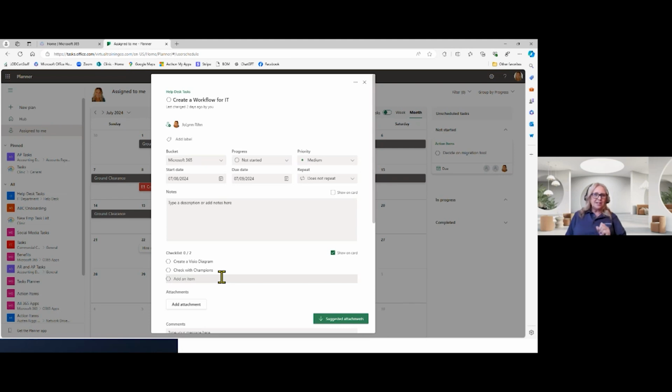So if there are any project managers out there in the session today, I do a lot of project management. I teach project management, the PMP certification courses, but when it comes to managing a project, we always think about the WBS, the work breakdown structure, and we have deliverables. That's what this technically would be, this is going to be our WBS. And then it's broken down into deliverables, work packages, and then the activities themselves. That's exactly how Planner works. And you're going to see how it even does it with being able to create relationships. So you're going to have your dependencies and all the normal things that we use with project management as well.